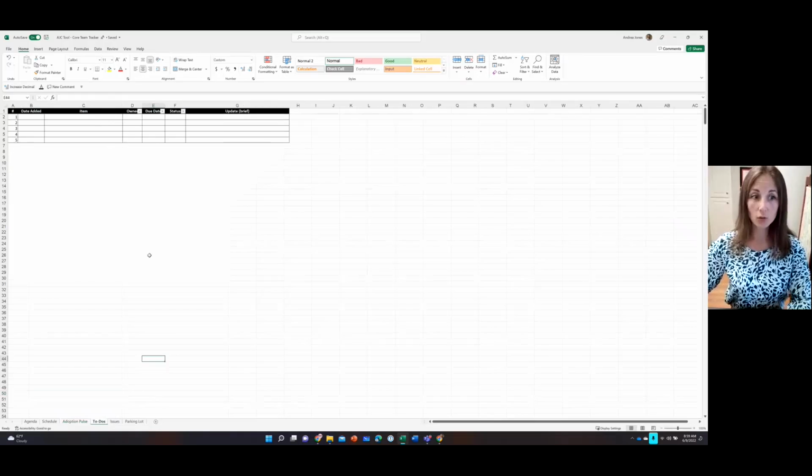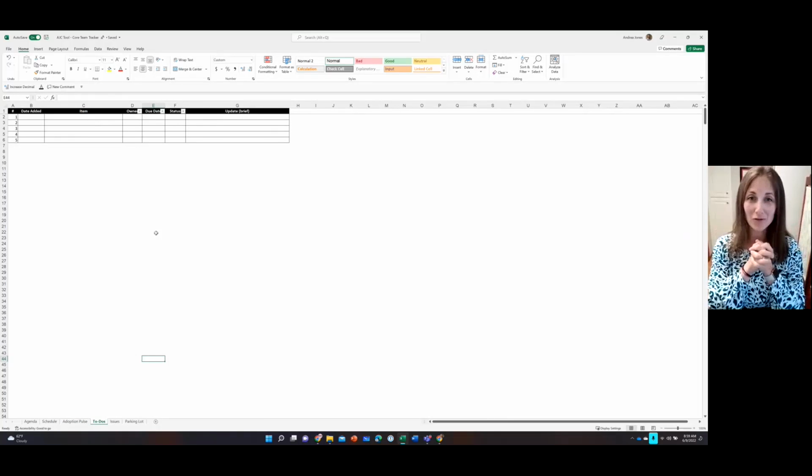All right, moving on to to-dos. These are all the action items that you've been tracking from any meeting previous to this one. And you just go through the list. Is this done? Is this done? Is this done? If it's still open, give a quick update. Why is it still open? Is this the type of thing that will be able to be closed, or is it warranting more discussion? Do we put it on this issues list? If it's closed, great. If it warrants more discussion, put it on the issues list. If it's just, hey, I was supposed to call that vendor and get some information and they need to call me back, I'm expecting it this afternoon, just keep it open for another week. Use your discretion here.